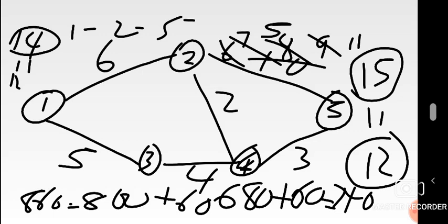Let me just erase the screen. There's been so much, but before I erase, we've just reduced to day 5, so the cost has equally gone up. 920 plus 60, because this activity has a cost per day of 60, gives you 980. Currently, that's your cost. So just erase the screen so that we shift our focus to the other critical path, because we only crash critical paths and see how best you can crash them. You only stop crashing when you reach the limits. That's just what I can say about when to stop.